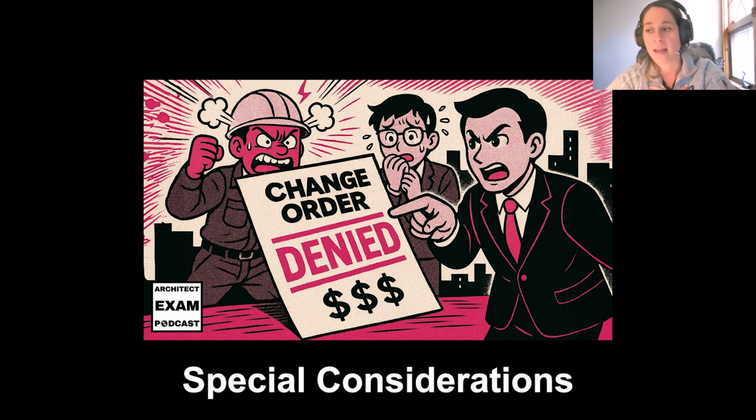So essentially, myself as the architect, I don't want to get a claim against me from a third party, so I'm going to have an indemnity clause in my contract. There are different types. First, there is a broad form of indemnification where the indemnifying party assumes all of the liability of an issue. There's an intermediate form of indemnification, which is proportional to a partial negligence contribution. And then there is the limited form of indemnification, which covers only the indemnifying party's negligence.